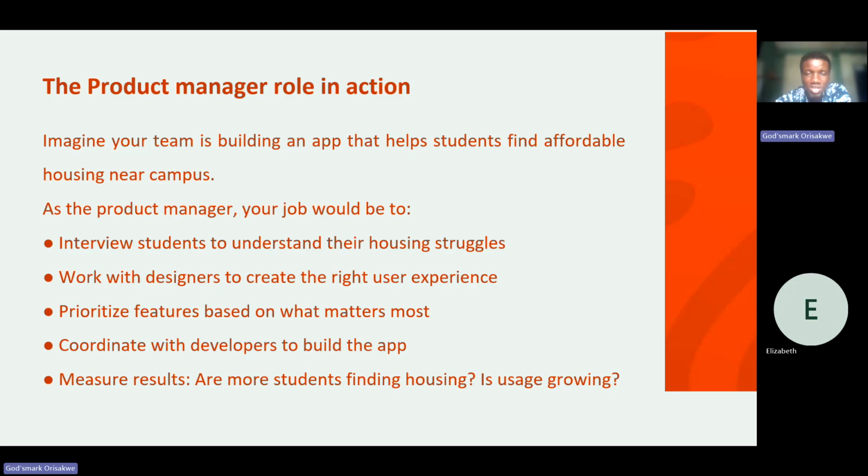So with that feedback or insight from the developer, if that's possible, we can actually go ahead and build the two apps. Let's say the developer I'm working with doesn't know how to use Flutter, he only knows Android, that means we end up with just an Android app. I'll now find out, are more of our users Android or iOS users? If more of our users are iOS users, I will not go ahead and build an Android app. Who will use it? Rather, I want to look for somebody that can build in iOS. So you can see how, as a product manager, I'm already deciding and managing the tech aspects of it.